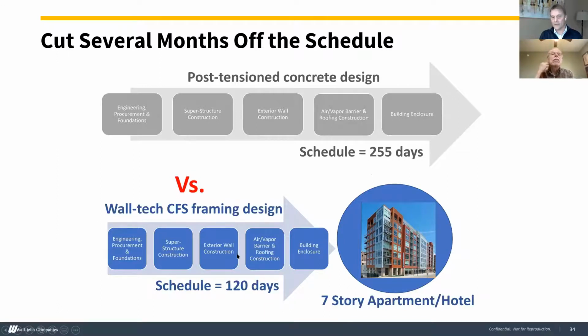You get things engineered. We do individual panel drawings, coordinate everything. And then you're prefabricating those components as the foundations are getting dug and installed. So that's the biggest benefit. You're getting all that done as the rest of the system's being put in place. So if you wait until the last minute, you can't really leverage the benefits as much.